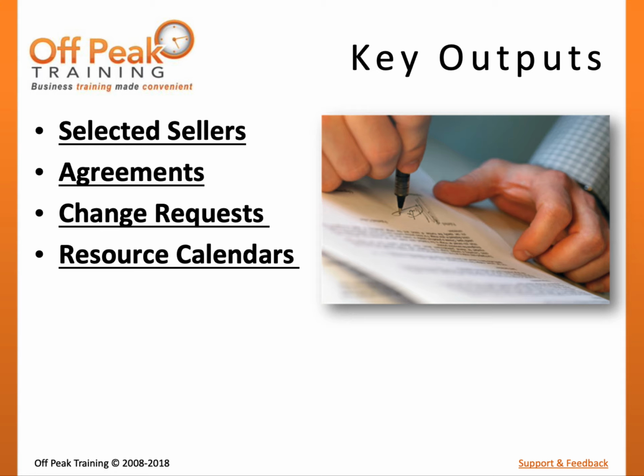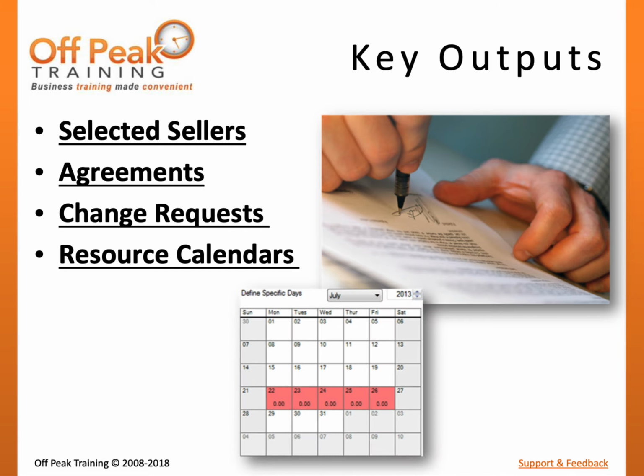Once a contract agreement has been awarded, the terms and conditions may differ from the original project plan. This may lead to new resource calendars or change requests to the project scope, schedule, or budget. Resource calendars, similar to those that were an output of the Acquire Team process, are an input to several time planning processes such as Develop Schedule. Change requests will be reviewed by the integrated change control process to help ensure that all project baselines are properly updated.